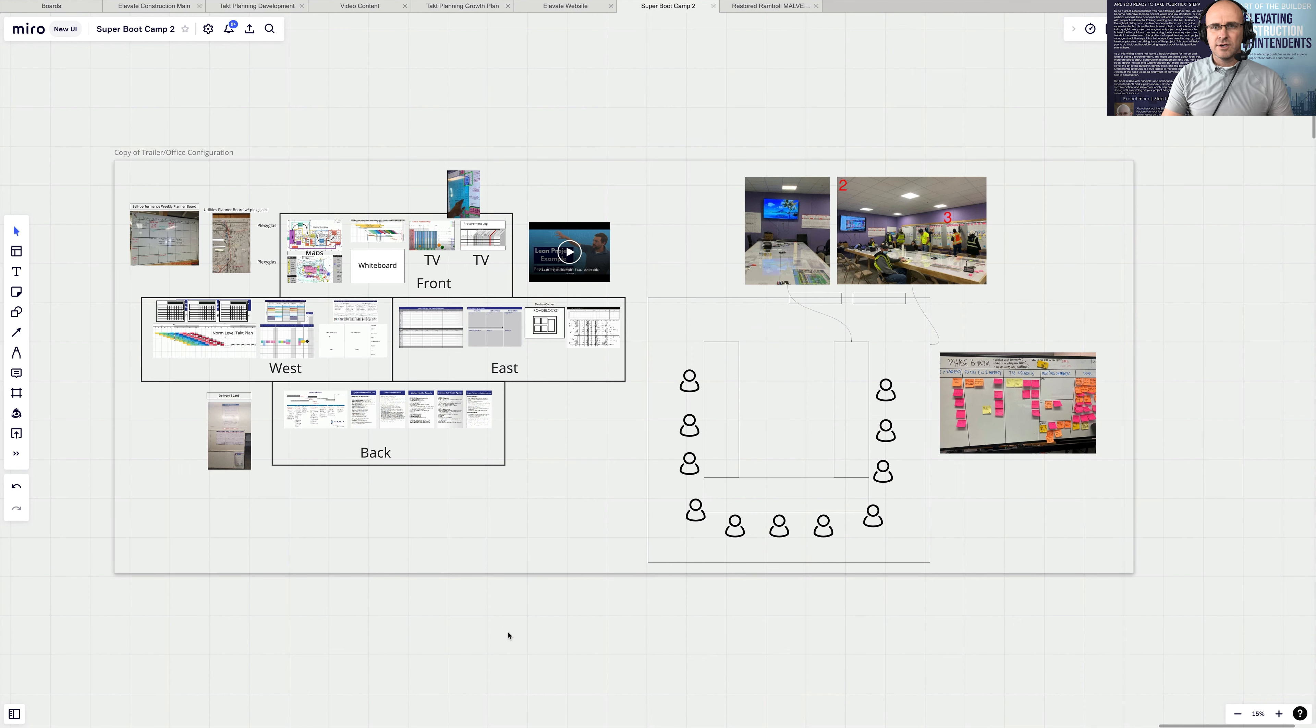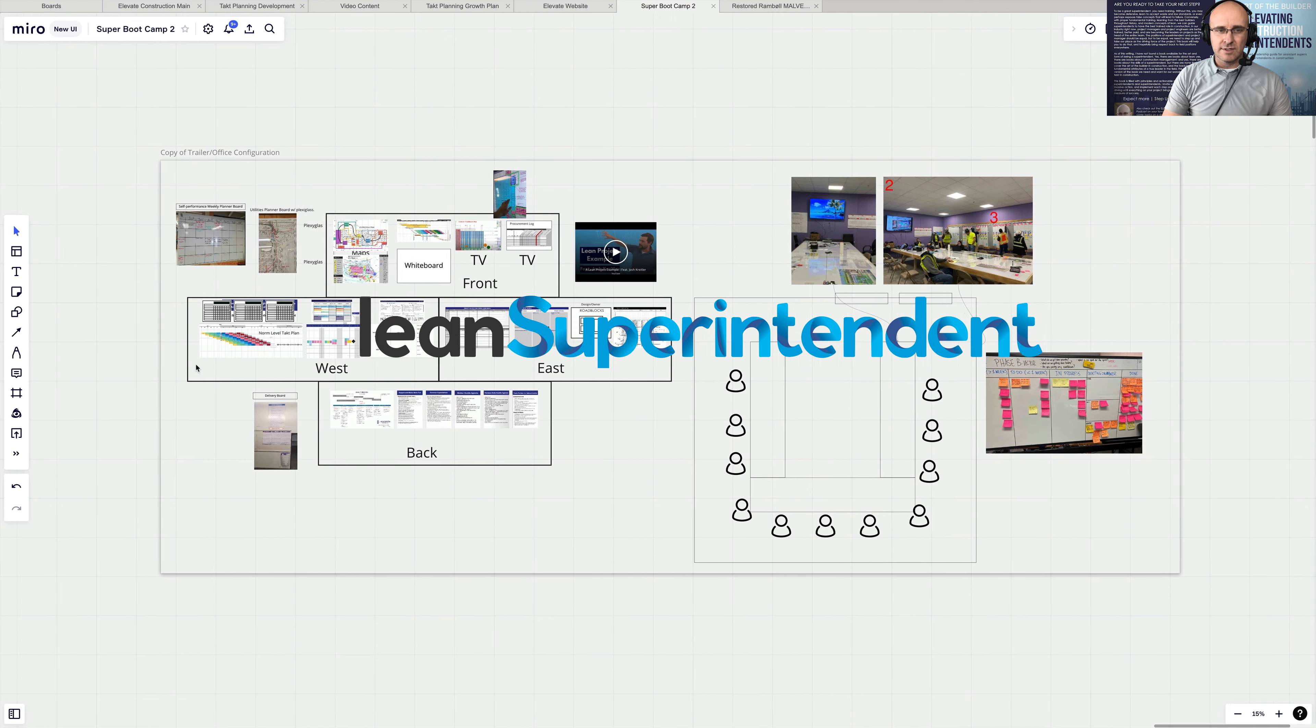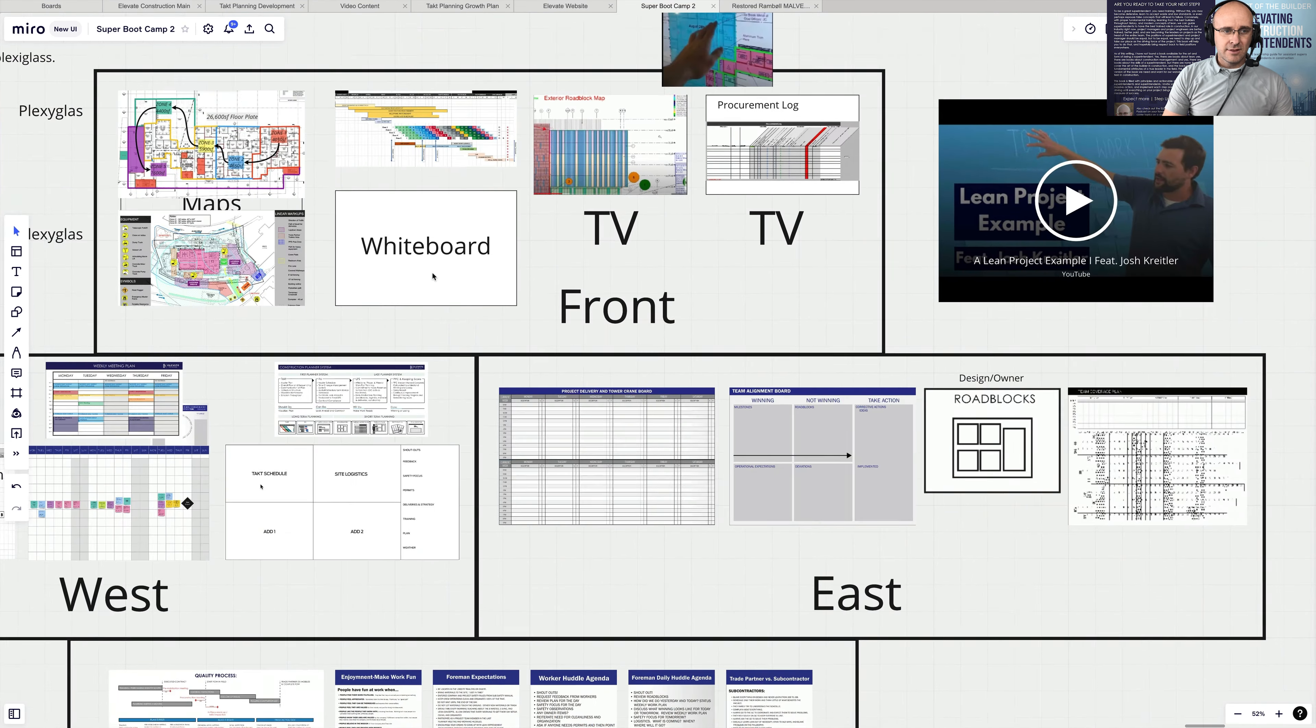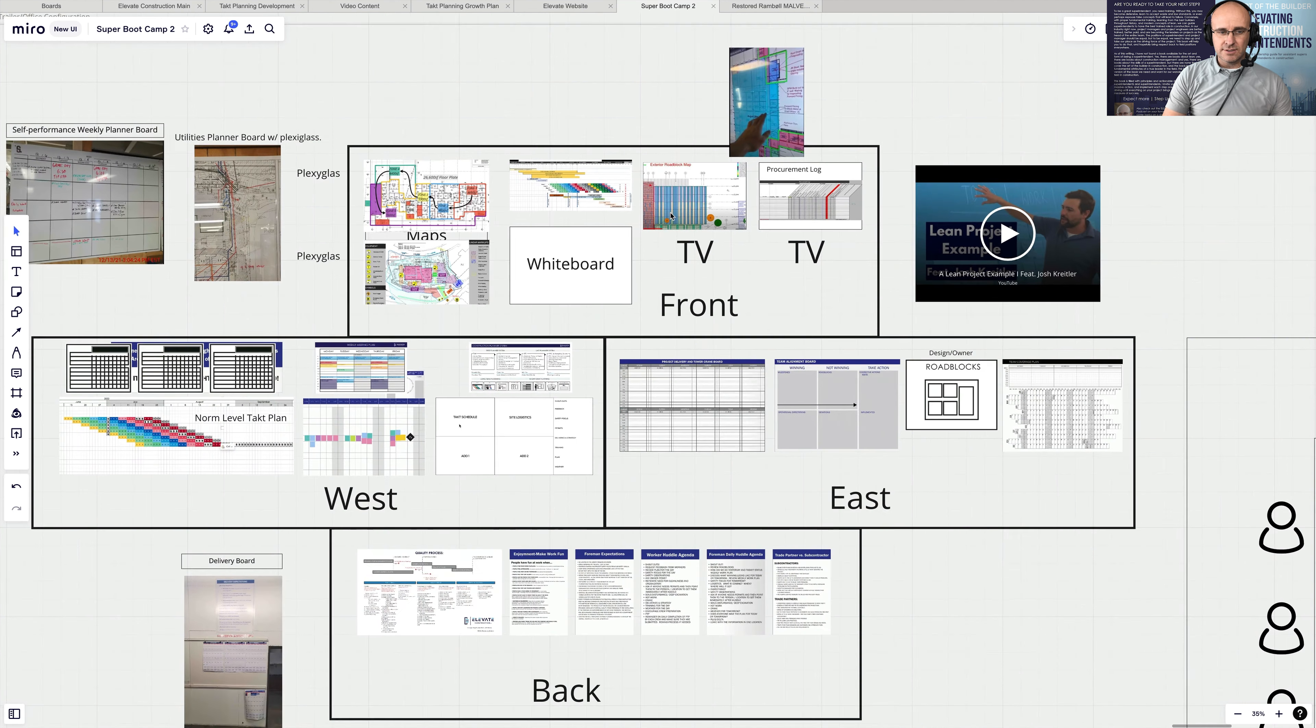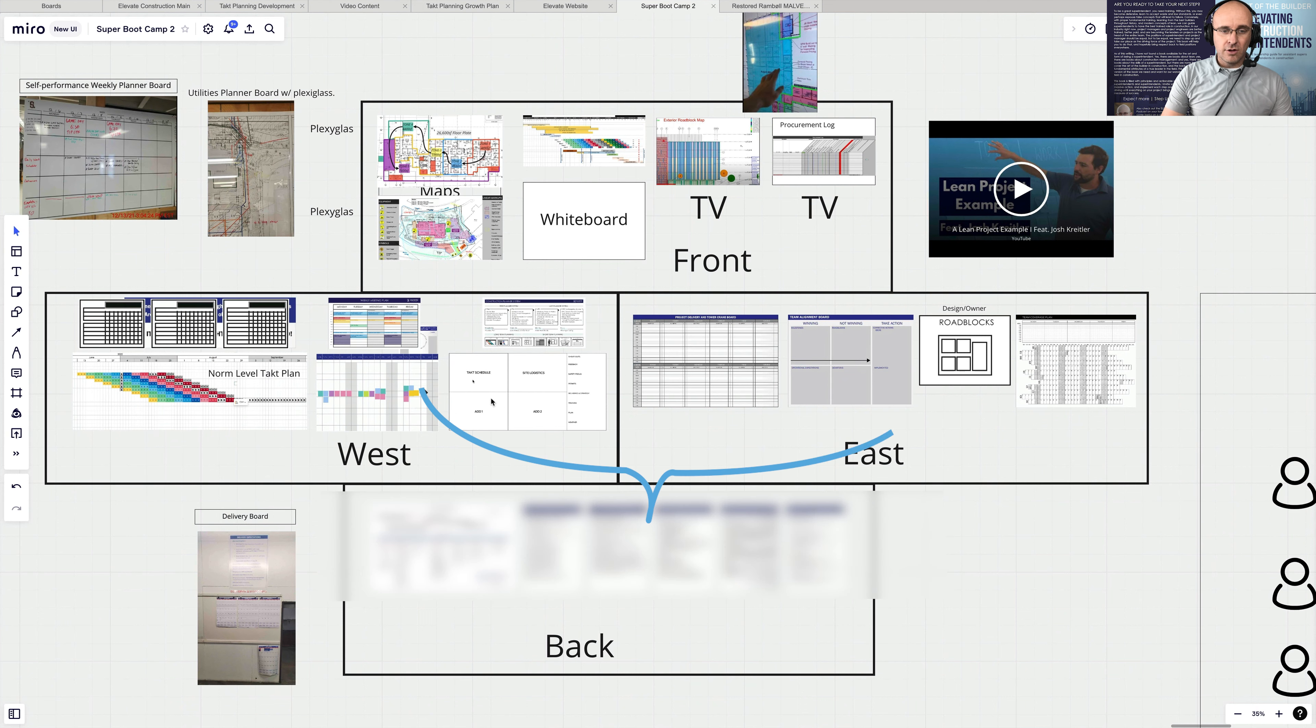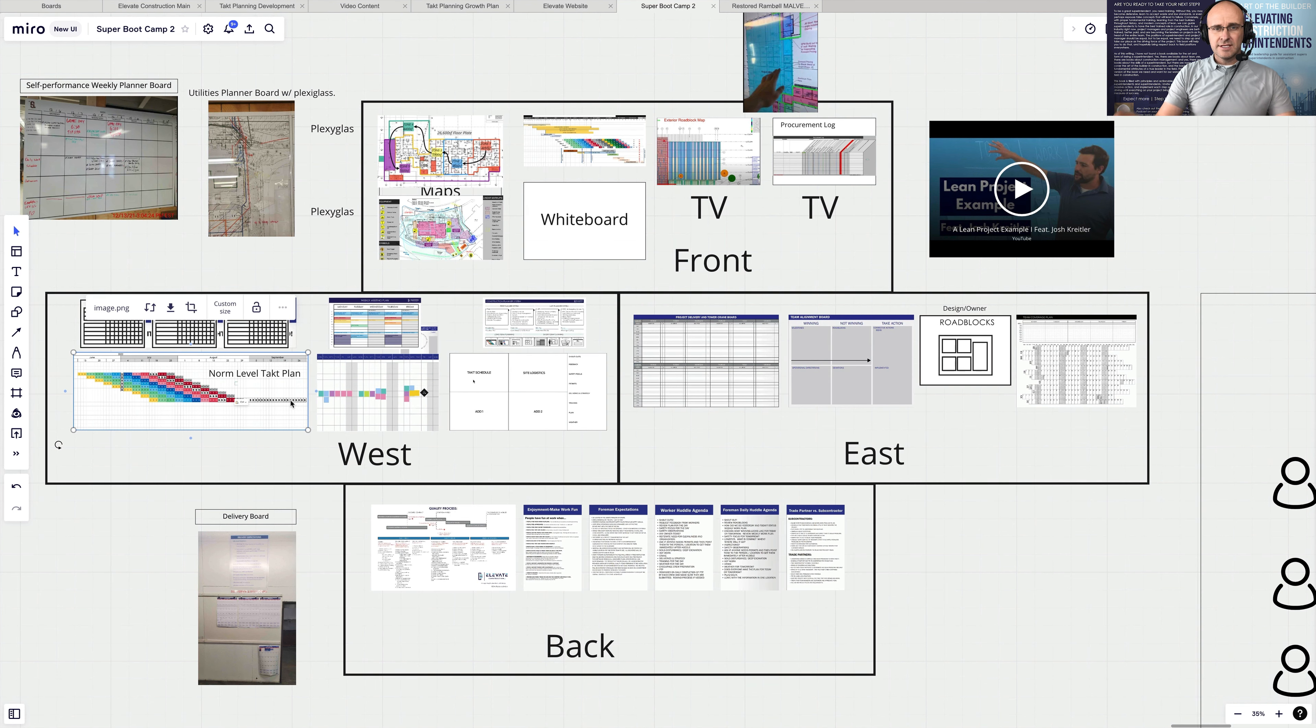And so I'll show you a couple of these on this Miro board. This is included in our superintendent Miro board where we share with the industry. But let me say that things like logistics maps, sequence maps, having your takt plan, whiteboards, your roadblock maps throughout the project, your calendars for your six-week make-ready look ahead, your weekly work plan, and your day plan are all crucial considerations when you're thinking about designing your trailer, your conference room.